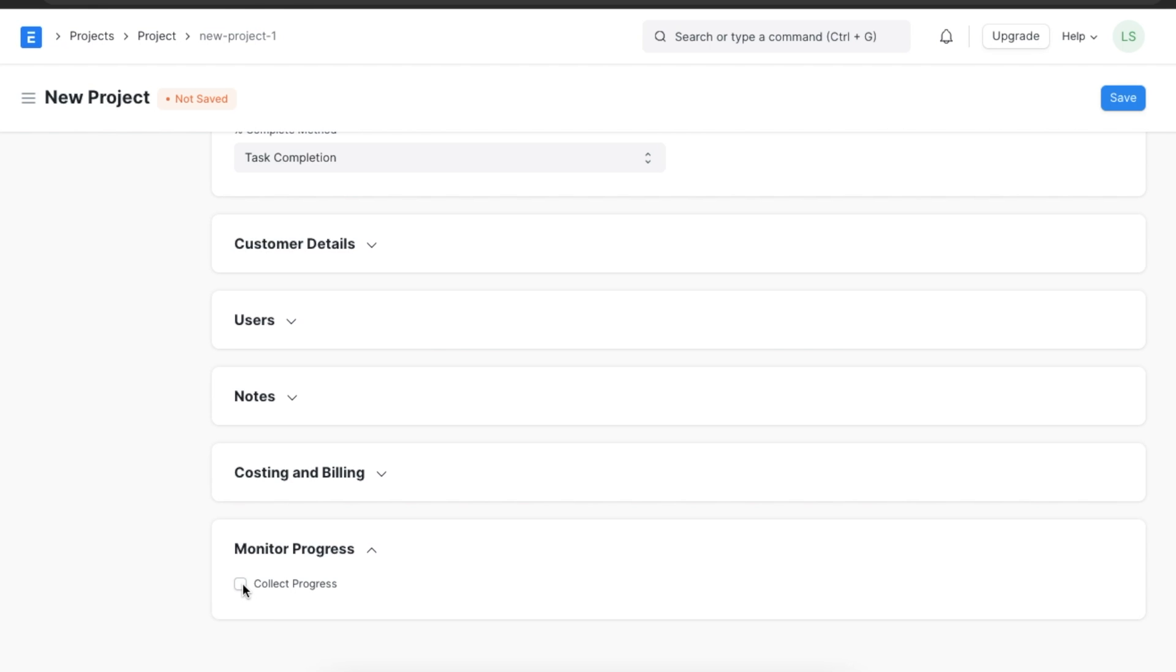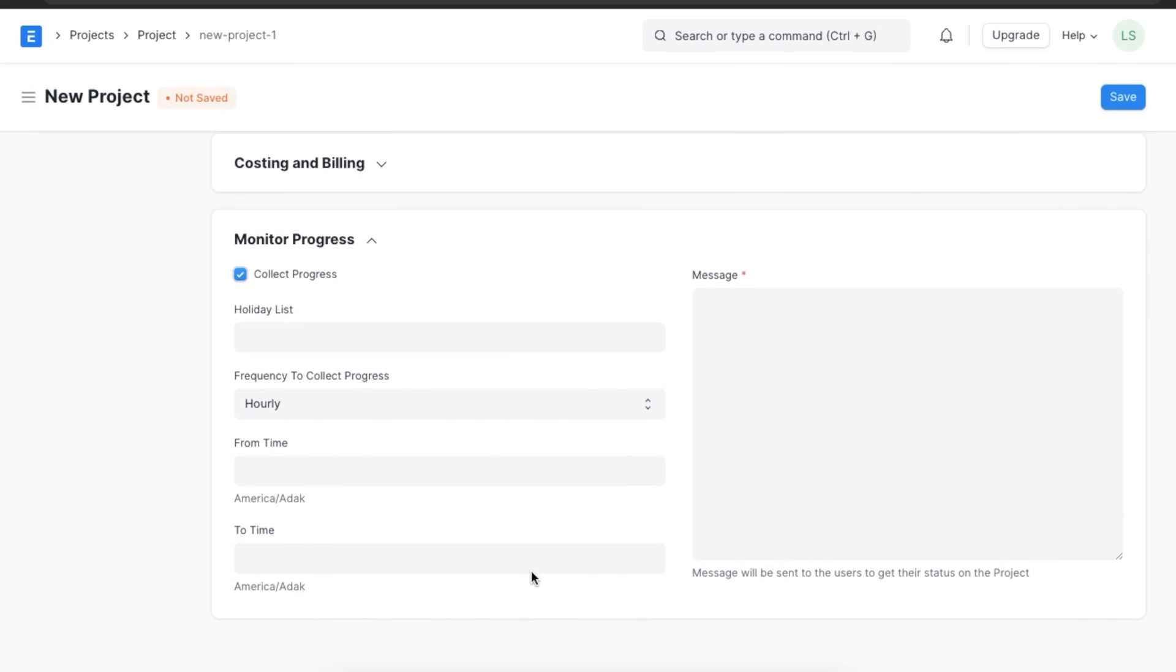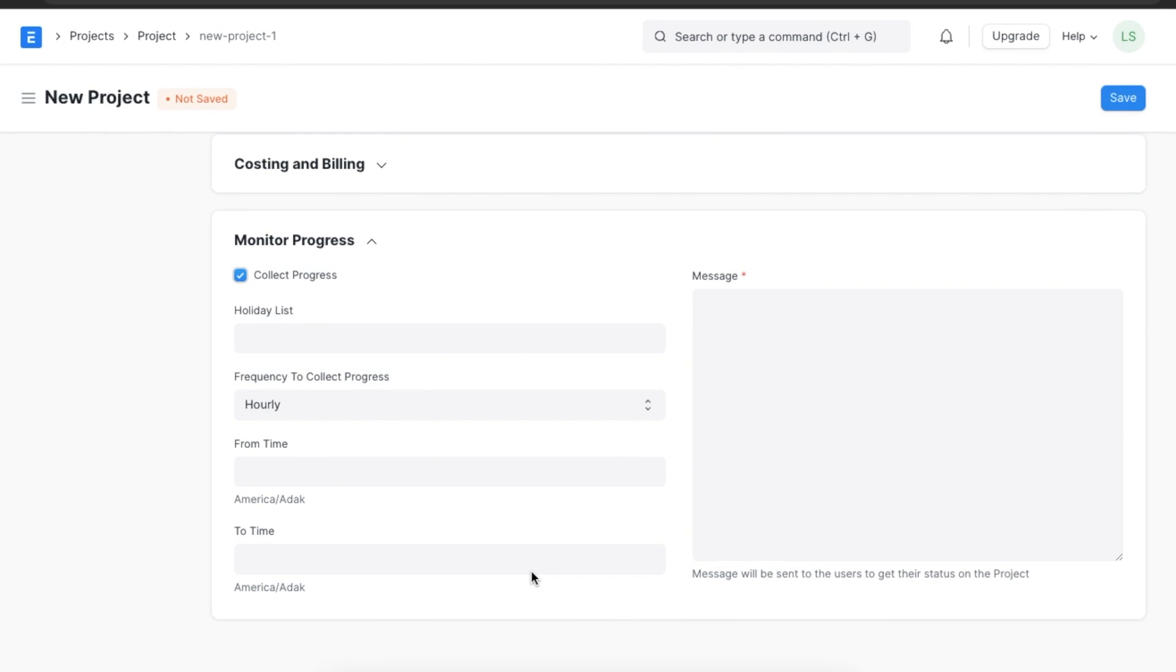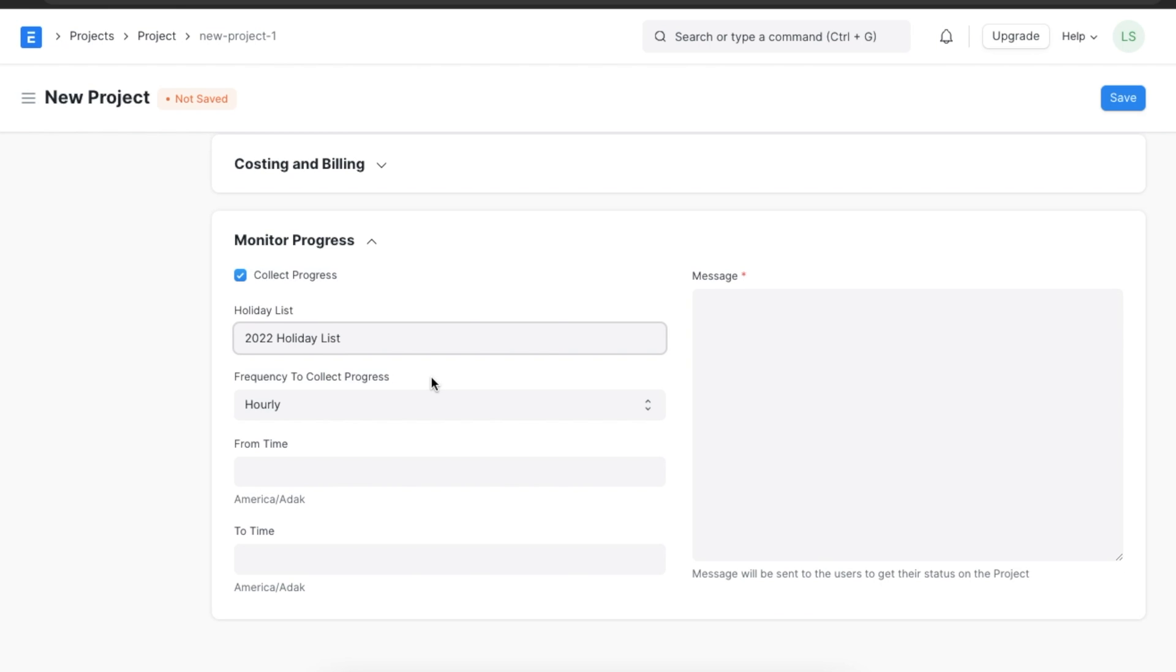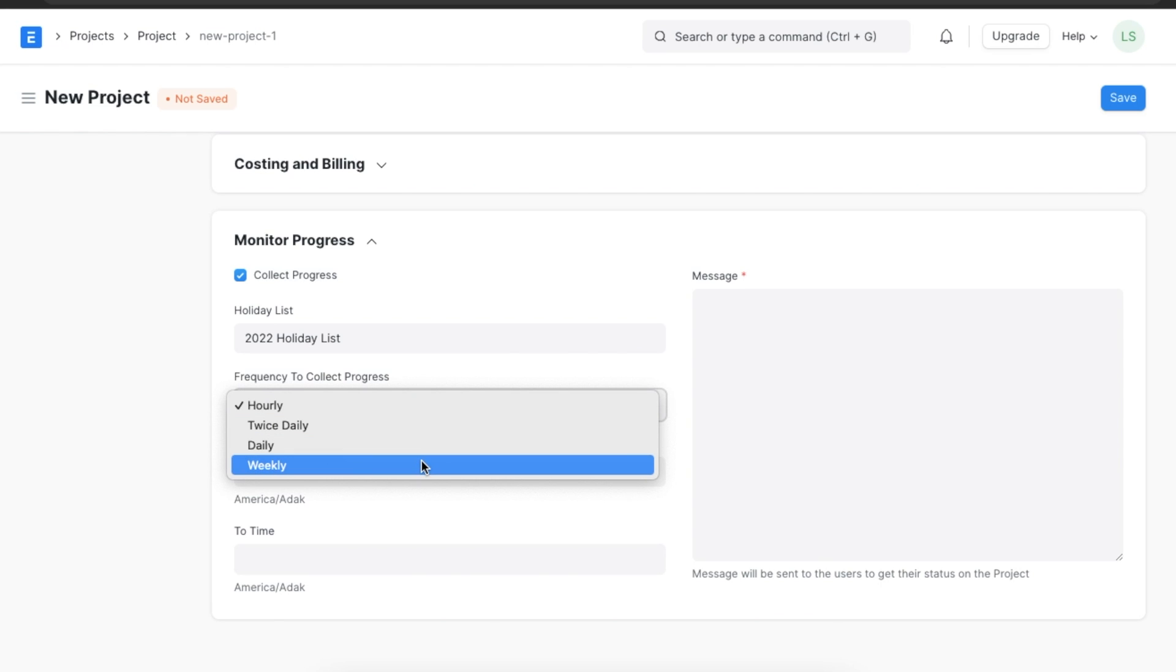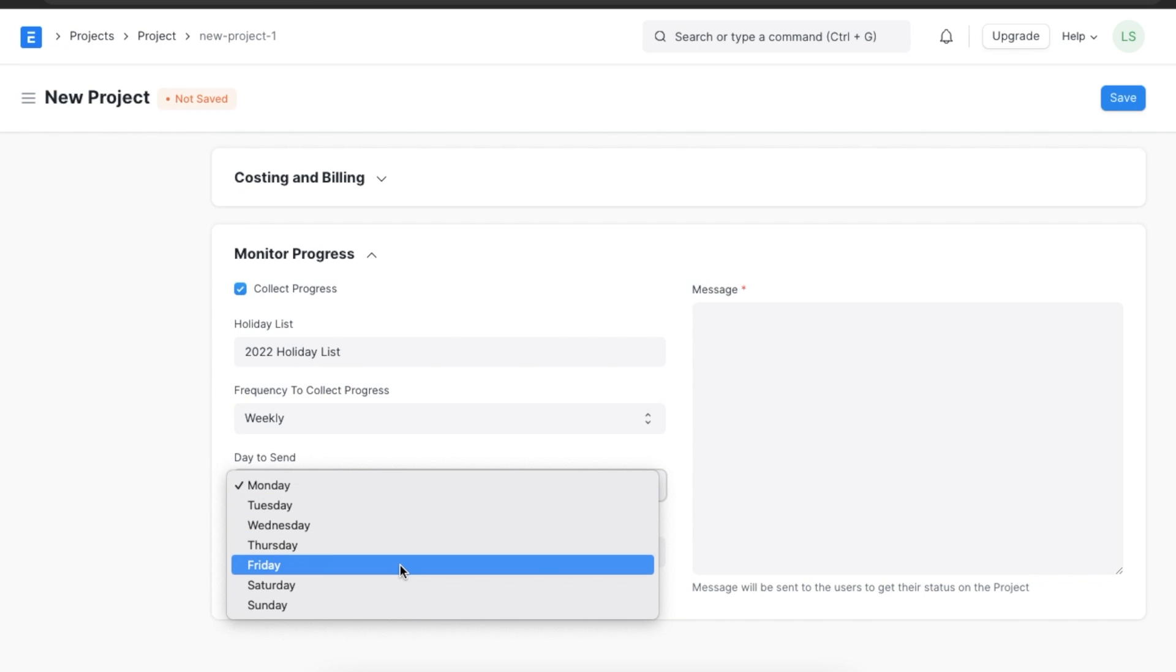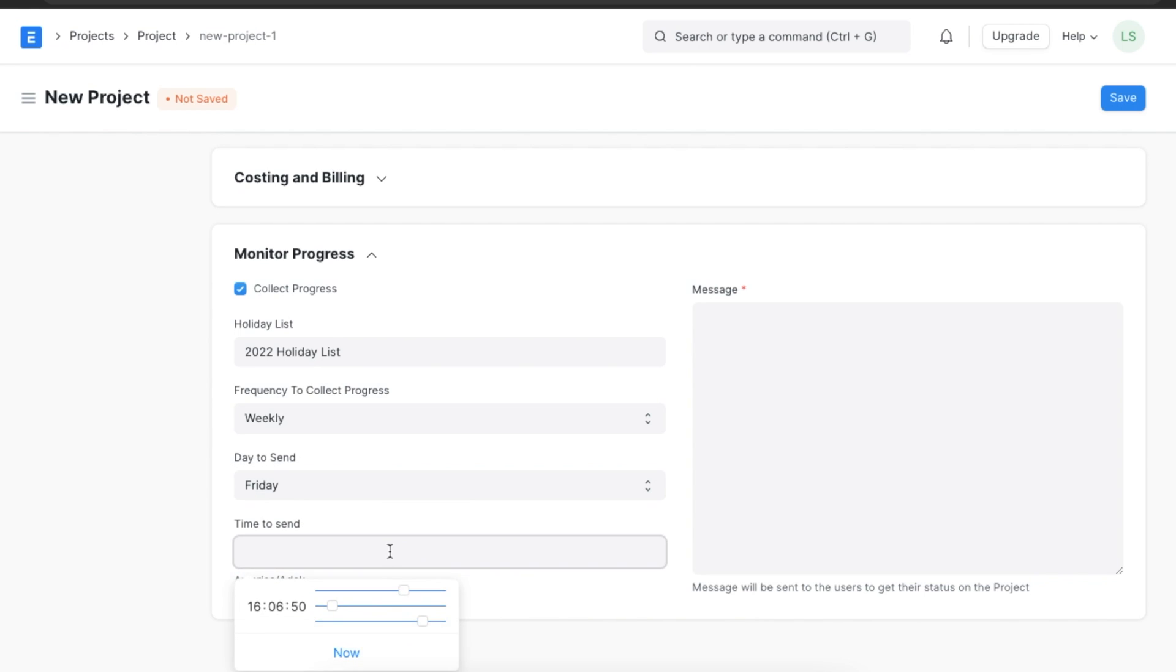The last section is the monitor progress section. We can configure ERPNext to trigger emails with the details of the project automatically by ticking the collect progress checkbox. First, we can select a holiday list for this project, which will enable progress to be collected only based on working days. Next, we can select the frequency we want for progress collection. Suppose we want the project's progress to be collected weekly, we need to set a day and time when the project progress update will be sent to users. Once we do that, we need to add a message that will accompany the email sent to users in this project to update them on the status.